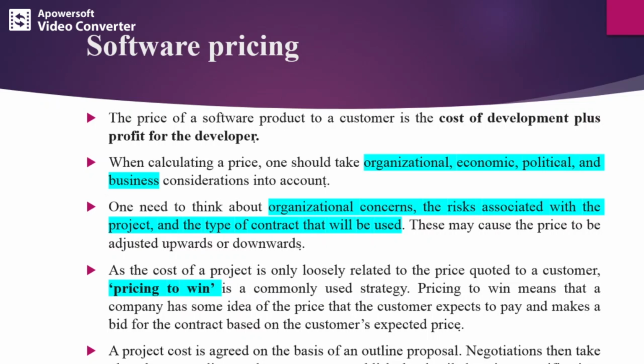You need to think, analyze, and then tell the price. You have to consider the cost incurred from the initial stage, like the requirement stage, till the end, it might be till your testing stage. In that, you need to include all the different factors which have affected it.